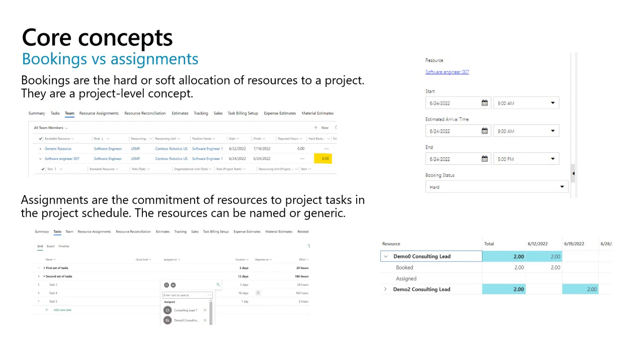As such, project operations doesn't enforce the agreement that the sum of the bookings for a resource will equal the sum of resource assignments across one or many tasks. However, the reconciliation view, which we will be seeing later on, helps the project manager to see where a resource's bookings and assignments don't agree.